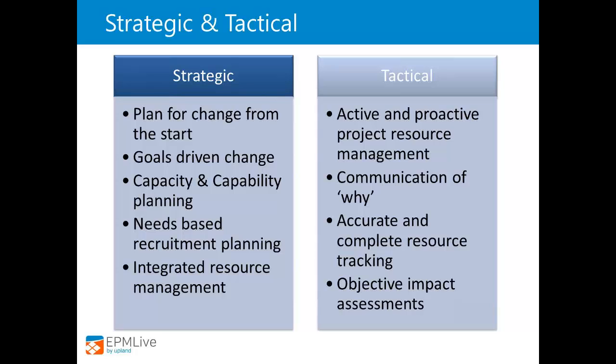The portfolio will change. Don't spend all of the budget right up front. If you've got a $100 million portfolio for the year, well, 25 million of that, maybe 30 million of that, isn't going to start until Q4. So why assign it right now? By all means, put it aside as part of the portfolio, but don't actually assign it to a specific project. Keep it in reserve in case you need to make adjustments throughout the portfolio. That's perfectly fine. You're not going to do any work up front anyway, so keep the options open. Keep the flexibility in place.